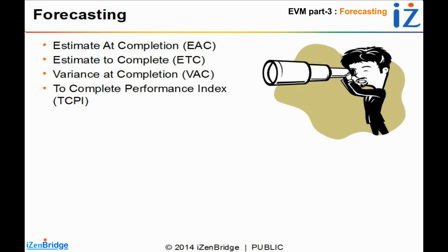So there are four type of measurement tools, or you can say calculations, discussed in EVM. First one is estimate to complete. So you are standing here, at the end of third month. What do you think? How much money will you need in order to finish the 100 unit work which you have planned initially? Your initial plan was 6 months and your initial cost was 1,000. Now, what more you need after spending $500? It is about estimate to complete.